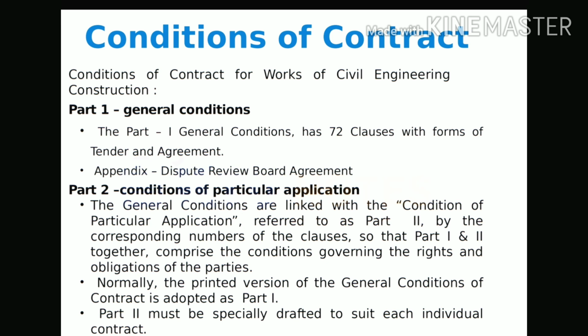Whenever the contractor fails to fulfill his contractual obligations in respect of the quality of the work, even after given notice by the owner, it becomes necessary to appoint a debitable agency which works at the cost and risk of the contractor. The expenses incurred are charged from the bill or security of the original contractor.